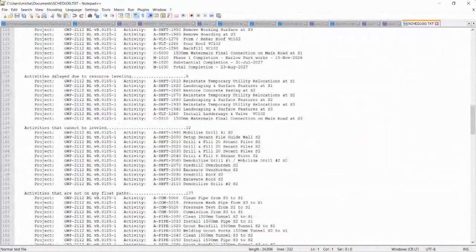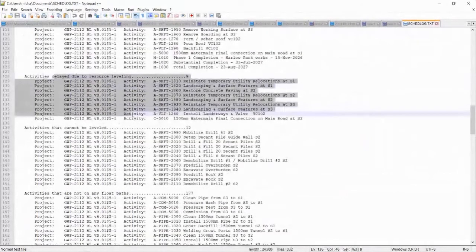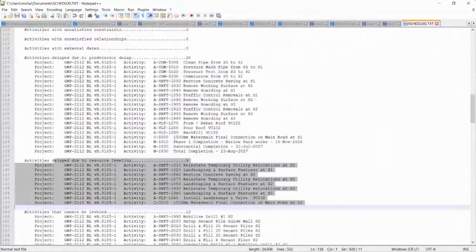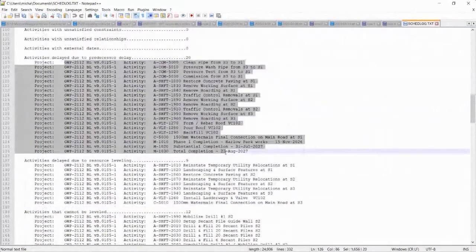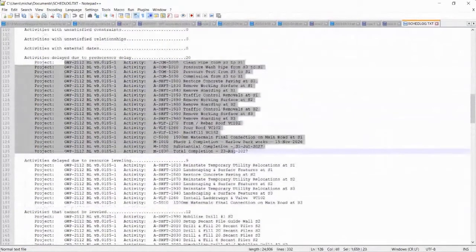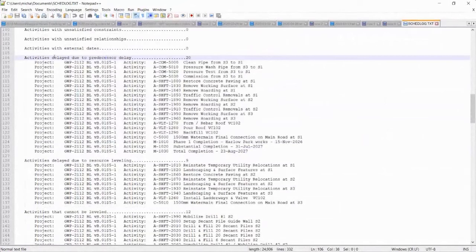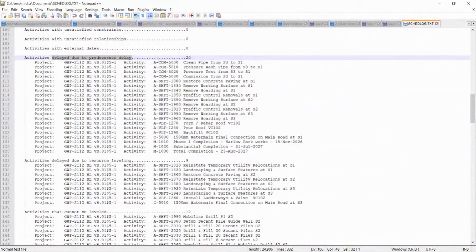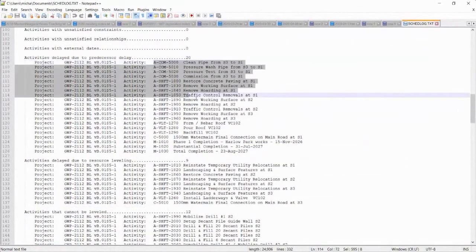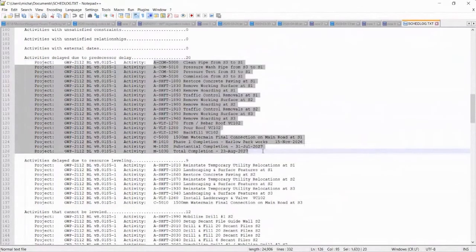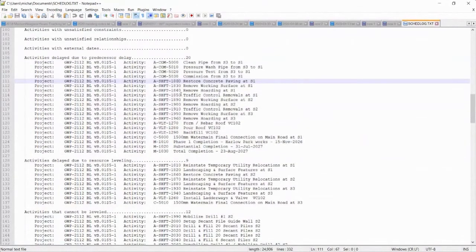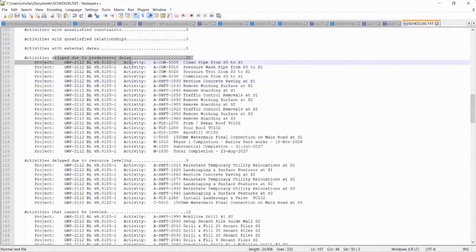Yeah, so here, activities that cannot be leveled. Activities delayed due to resource leveling. But again, it's not easy to decipher what this thing is. So I think this is it. Activities delayed due to predecessor delay. So it moved these 20 activities. But it doesn't tell you where it moved them or anything. It just says it delayed them.